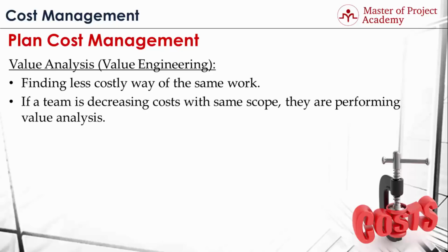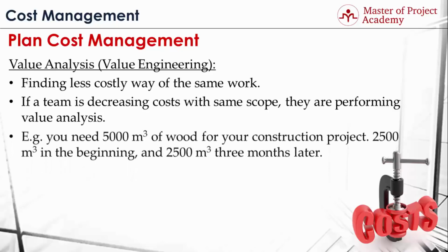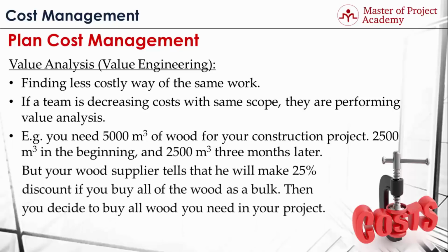If a team is trying to decrease the costs with the same scope, they are performing value analysis. In order to describe value engineering, I will go over a sample scenario. Let's consider that you need 5,000 meters cube of wood for your construction project, and you need the first 2,500 meters cube in the beginning of the project and the next 2,500 meters cube 3 months later. However, your wood supplier tells you that if you buy all 5,000 meters cubed at once, he can make a 25% discount from the list price.